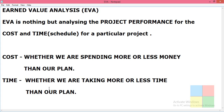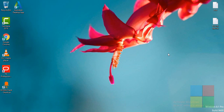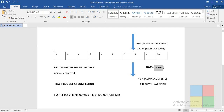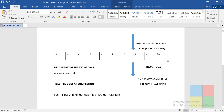We will see this in the software using a simple example. So I'll open a simple problem to make you understand what EVA is. We basically have an activity — Activity A — which is of 10 days. We have planned to spend 1000 rupees for this project: each day 100 rupees, for 10 days that will be 1000 rupees.